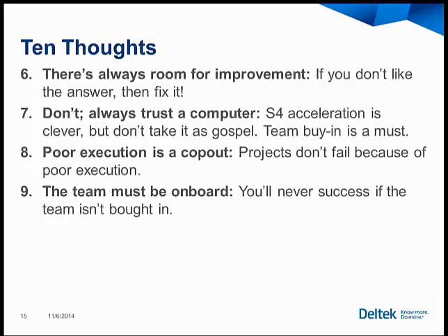There's no reason why I can't do a what-if optimization exercise at any point in program execution. In the past, I wouldn't have wanted to because it's time-consuming. Now I can do it in an instant and see what the impacts would need to be to meet that date. Why not do it? Why not look at those opportunities for improvement to balance out the risk assessments, the monthly risk assessments that we may already be doing? So give me the bad news, but let's try to find the good news as well. Let's not do that once. It's quick to do. Let's do that as early and often as possible.